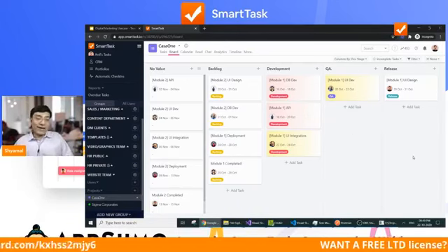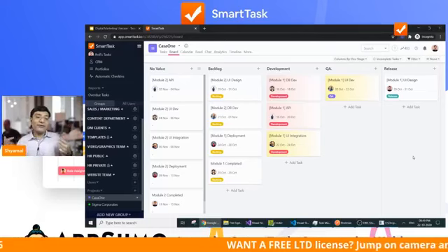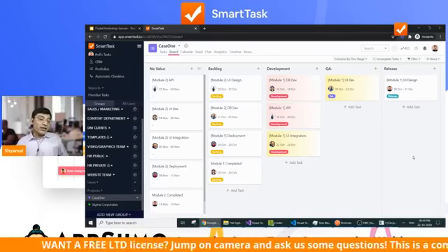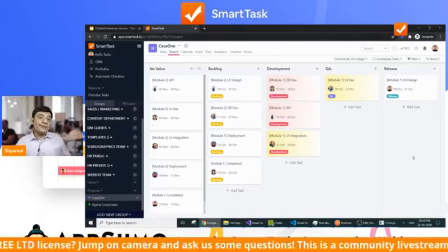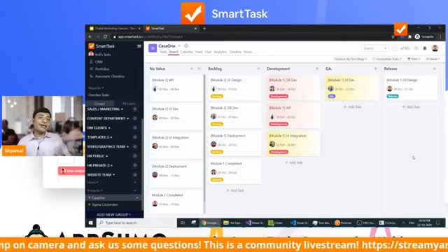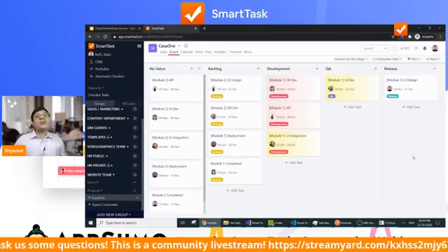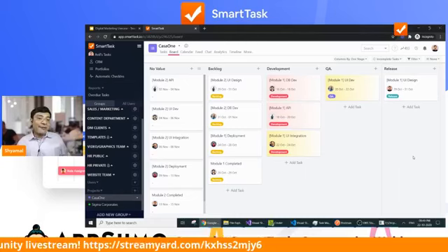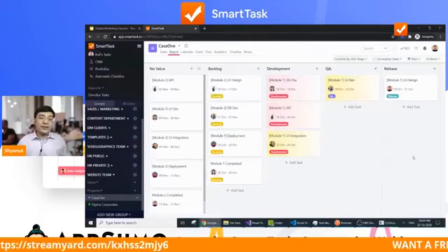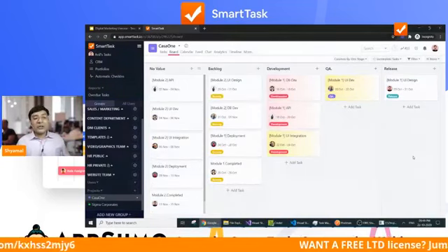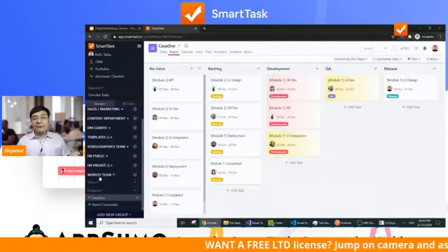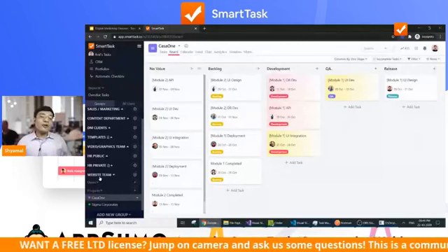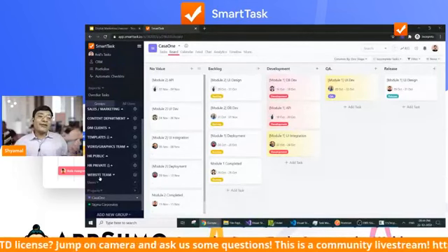So they analyze again. At the end of the week, they will analyze and they will figure out, okay, what tasks are still to be worked on. Why were we not able to complete all of the tasks? And depending on those analysis, they again will start a next sprint. So sprint typically is of a week, but depending on your workflows, you can have a month sprint, you can have 2 week sprint. That's completely up to you. So this is how the website team will be working. At the same time, all of the teams come together in a single place where all of your informations and the client details are.